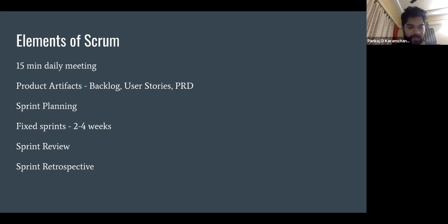Okay, I'm in sprint 2. That means my developers are already working on tasks for sprint 2, right? Correct. They're already coding something. They've been given some features or bugs or tasks to work on. So while sprint 2 is running, I will do planning for sprint 3. Whenever sprint 2 gets over and the developers' tasks are finished, and sprint 3 starts, because I have already planned what tasks I want to give them, they're ready to be given to the developers.